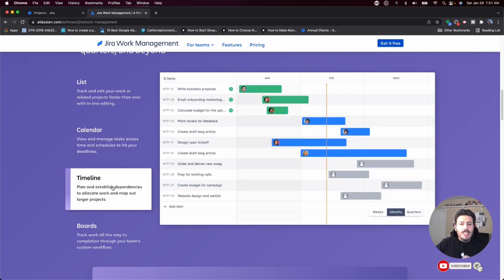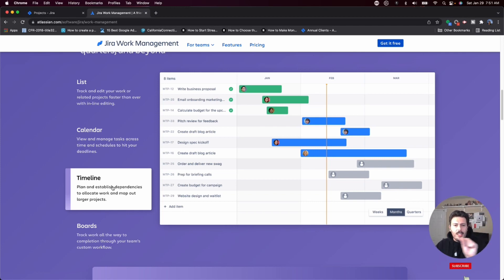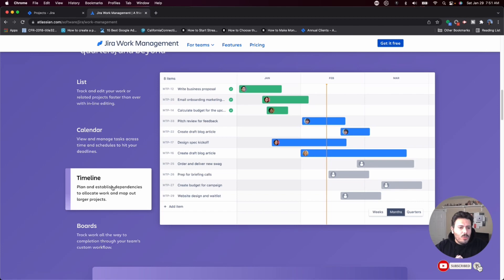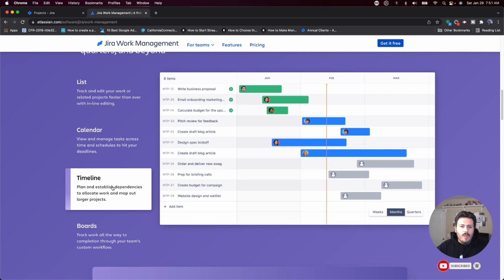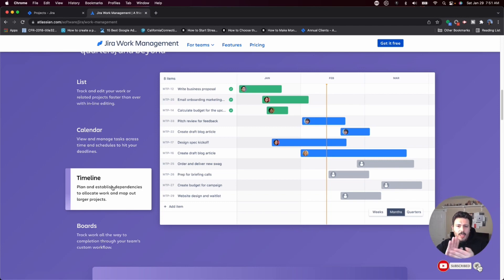The timeline is a very similar view — you'll have every item and the person responsible, but in a more traditional Gantt chart format, where you'll see a start and end date and the duration of every task. You'll also see the overlap and how different tasks can be run in parallel or which ones need to be done sequentially, meaning one after the other.